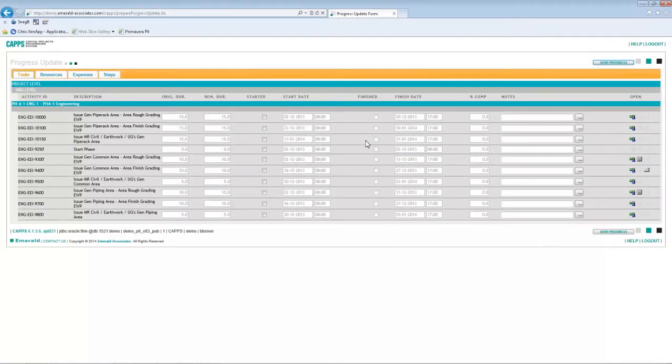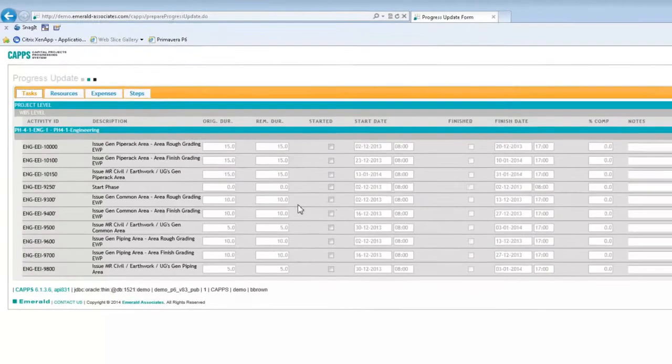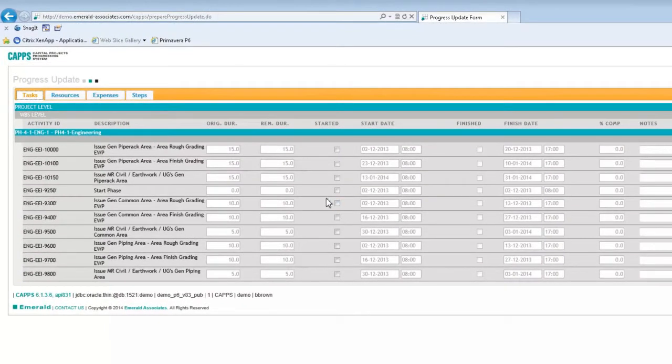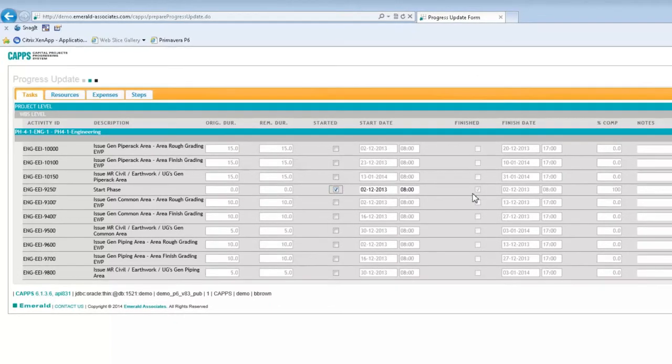I will now demonstrate how to update a couple of tasks using CAPS so that you can see how the update process works. I will start with a milestone, and I'll select the started checkbox, and you will notice that finished checkbox has been selected for me automatically. That's because it's a milestone, so it's not that difficult to update.